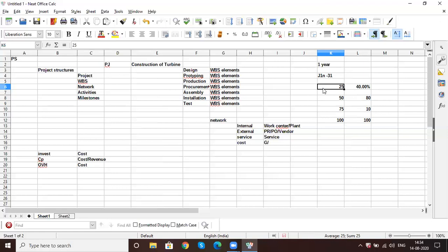Okay. Then how to automate it, sir? Means how exactly do we know 25% is completed? So 25% you will define in the agreement, saying that after completion of a production of all the materials, I can define this 20% is done. Which means after this WBS element is completely released and confirmed, you will say 40% of the work value has to be released from the customer.